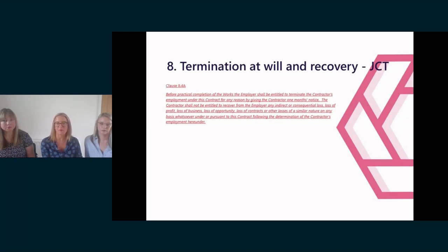Once a decision is made by that employer to terminate the contractor, that employer just wants them gone from site without having to see out a few weeks or a month, with them still on site doing the bare minimum, which potentially causes delay to the project. Whereas the contractor will want to have a longer period to demobilise and get their affairs in order with their supply chain. The clause also makes clear that if terminated for no fault, the employer is not liable for any of the contractor's losses which flow directly or indirectly from that termination, which, as I say, is different to a common law position on termination.